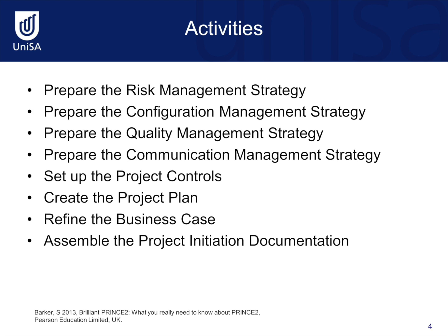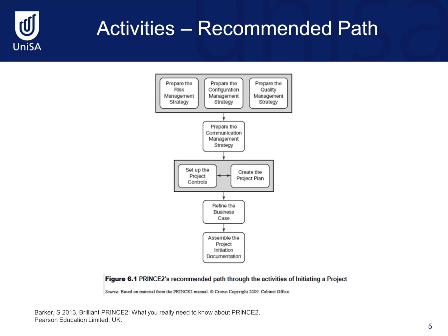As previously mentioned, preparing this information leads to the assembly of the PID, or Project Initiation Documentation. Here is a visual representation of what you need to be thinking about and the sequence in which you should think about preparing this information. So you can see some strategy documents at the top in relation to risk, configuration, quality, and communication management. Then you set up the project controls and create the project plan. You refine the business case and assemble the project initiation documentation.